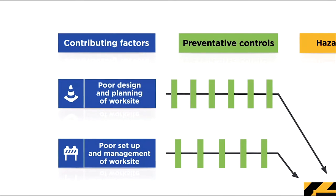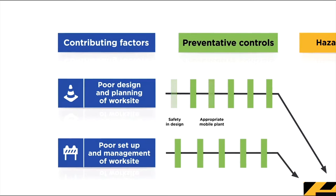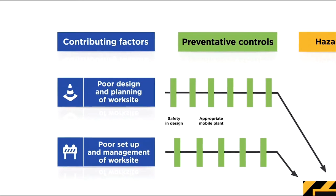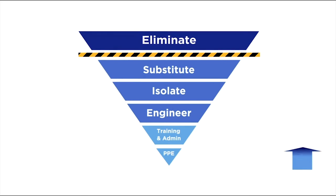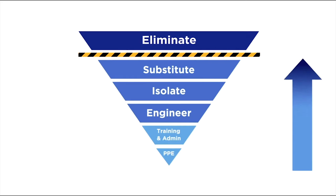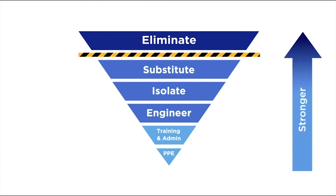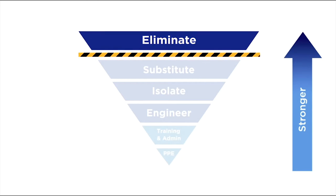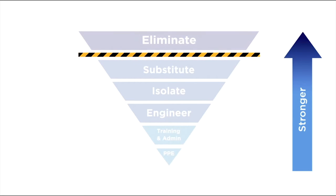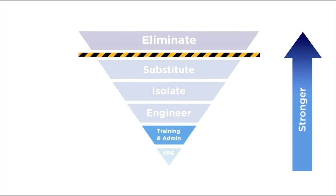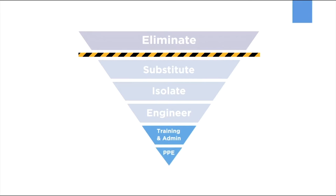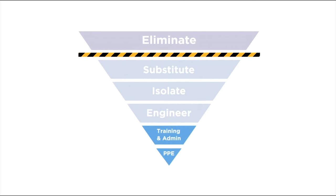Today we will look at controls in detail. Having the right controls in place is what keeps everyone safe. The hierarchy of controls shows the order in which controls should be prioritized to achieve the best safety outcome. Always seek to eliminate a hazard or risk first. If it cannot be eliminated then higher order controls should be chosen from the hierarchy: substitution, isolation, engineering. Training and admin controls and PPE are considered lower order controls and ideally should be used together with stronger controls.